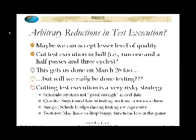And ultimately, there's often an attempt to throw buggy features overboard as you get closer and closer to the end date and realize you're not going to make it. Now, the problem is that can have unintended side effects on other parts of the system. So as you start taking stuff out, you realize, whoops, that feature over there actually depended on this feature being in there, and that can lead to the sort of cascading effect of consequences that were unforeseen, some of which are detected in testing and further slips occur.